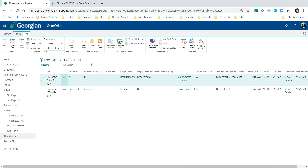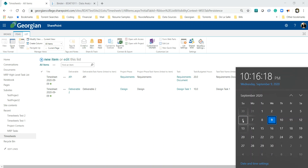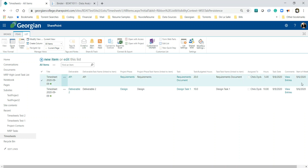Now we have a 'Start of Week' column. If we think about the task date — this one is the eighth — this says the start of the week is the sixth. Let's take a look: that's a Sunday. So it basically extrapolated what the start of the week is from the task date. Now we have a date we can pivot off for the start of the week. Every person will be finishing and doing things on all kinds of different days of the week, and the start of the week tells us the beginning of that week — seven days later would be Saturday — so we can group anything that happened within those date parameters.